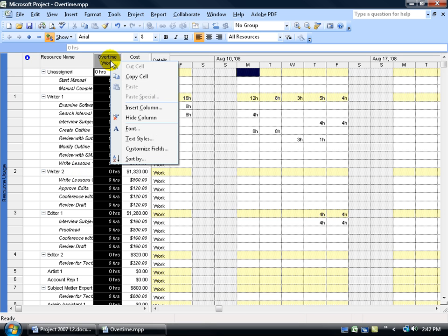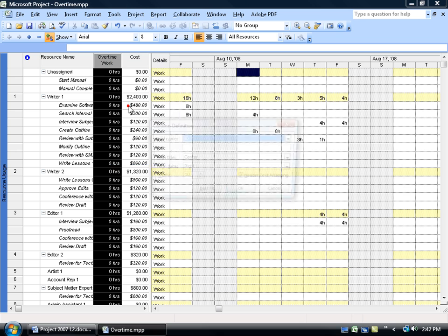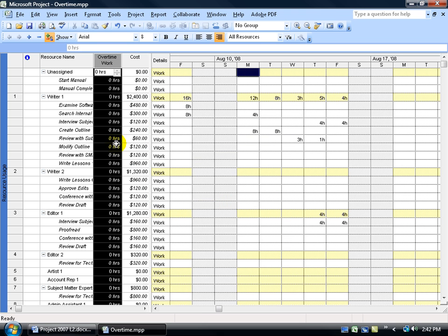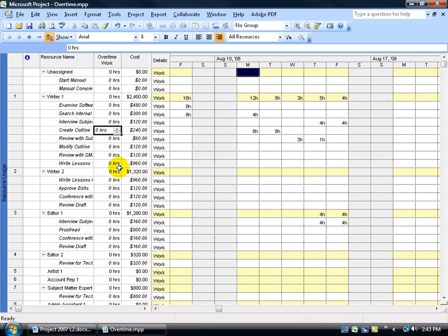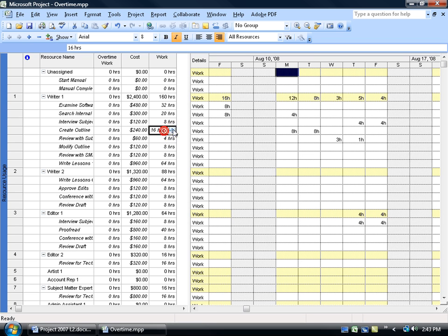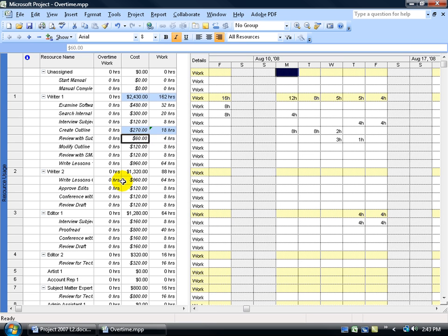Right click and insert your overtime work column. Down to insert, type in letter O and then select overtime, click OK. I already have it here. There's the task, create outline. It's no different than doing this in the task usage view, except let me click and drag and stretch this over. We've got our 16 hours. We have a different table here, but we just have to scroll over to see the work column. There's the 16 hours, increase it by 2, click off in a blank area.